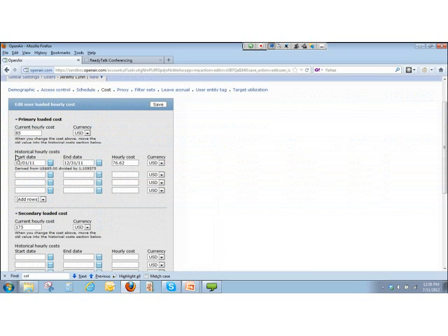So basically the adjustment I did was for the month of December, and because so many extra hours were worked, the value of each of those hours is dropped to $76.62. So when I run reports financially, it would show me this adjusted cost for the time period of December.